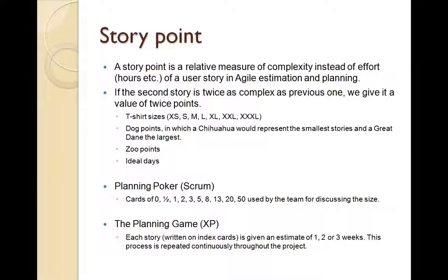Ideal days is the number of days that the story would take, assuming that there is no other work involved. So we are not counting the time that we spend on non-project related activities, which might include anything from your emails or meetings or any of the other discussions which are not involved.